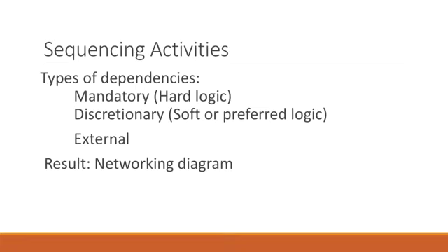But there might be other companies that prefer to start the development before the really thorough, detailed design has been completed. That's what we refer to as discretionary dependencies.